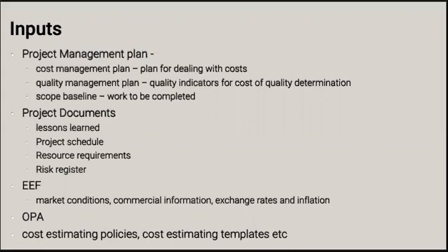We're also going to use the project schedule, because obviously we're going to have all the activities listed in the project schedule. We're going to have the resources available and allocated to the project schedule. We're going to have time reserves that we estimated for each of the activities, and those inputs would be useful in determining costs of the project. We're going to have resource requirements, which is essentially going to tell us what resources are required for which work and for how long that is going to be taking place.